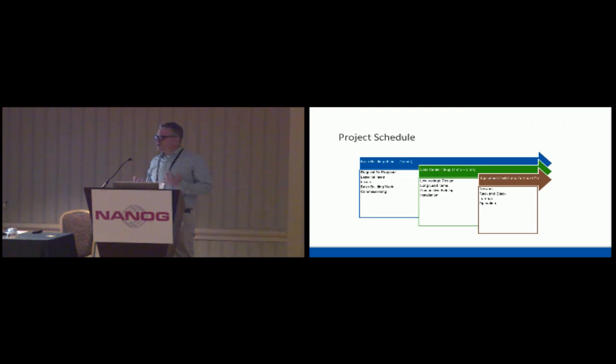So you want to make sure that there's a competitive process, whether you do it yourself or force your data center provider to run one on your behalf. You would be amazed at the spread I've seen. I've seen a 2x spread in just getting 3 bids on low voltage design to put in cabinets, overhead racks and fiber cross connects. It's all a function of how busy they are, how badly they need the work, and whether they're doing other work in the building or nearby. It's incredible how big the difference can be, so competitive bidding is really important.